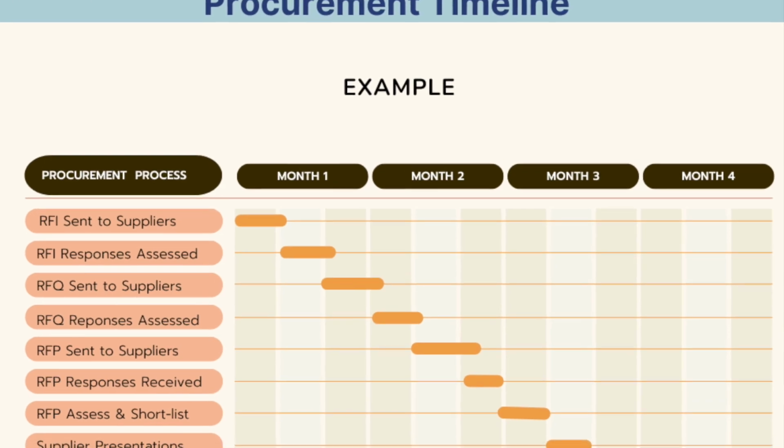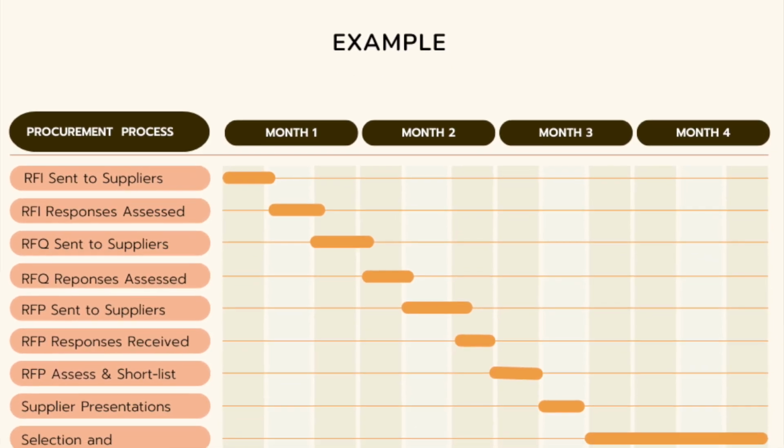Now, when you're doing the RFQ, one of the things you might need to start to tell the suppliers about is the procurement process you're going through. It's good to set expectations about timeframes and process. Also, it may be handy in the RFQ to ask for an example of contracts, maybe service level agreements. Now, I'll get into those in a few minutes, but what I want to say about that is seeing how they contract can also help you understand a little bit more about the contracting process, but also the company itself.